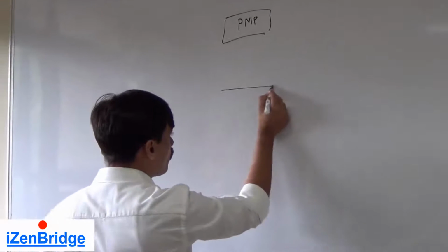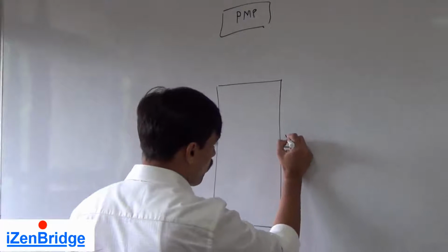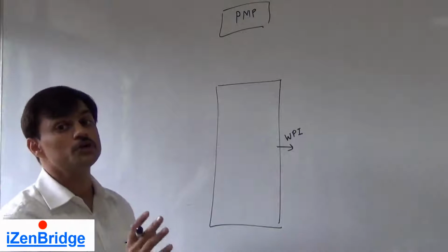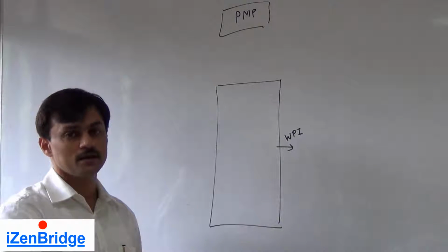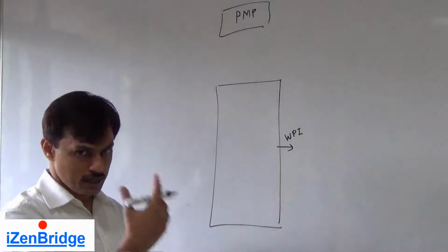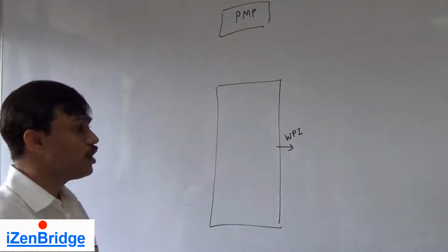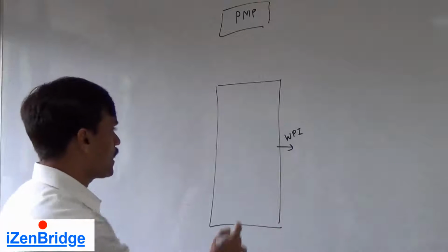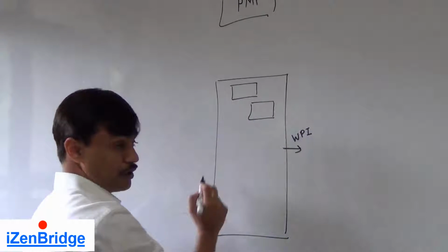We also need the output information, which is work performance information coming out of the rest of the control processes. Now, every knowledge area has a control process except human resource. So project human resource management does not have a process for monitoring and control, but the rest of the knowledge areas have one. The scope management knowledge area has two processes for monitoring and control.